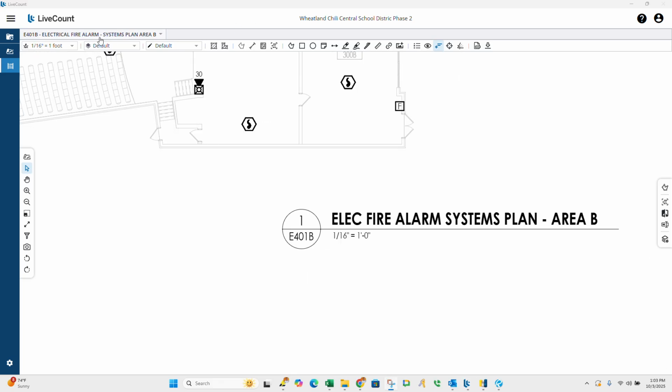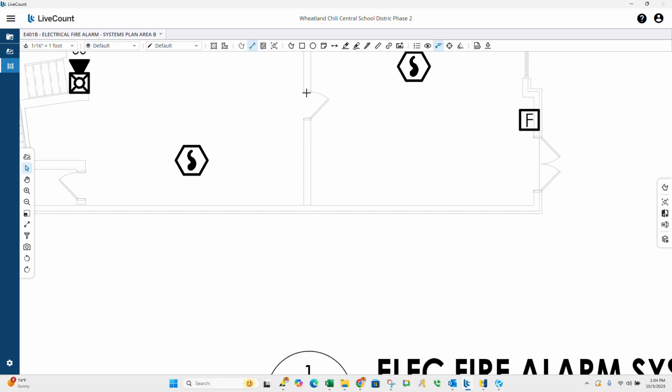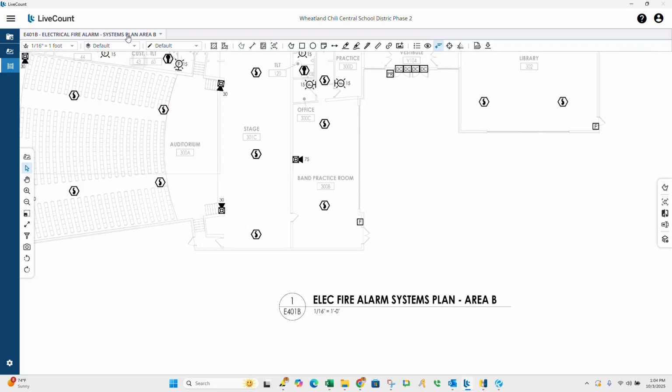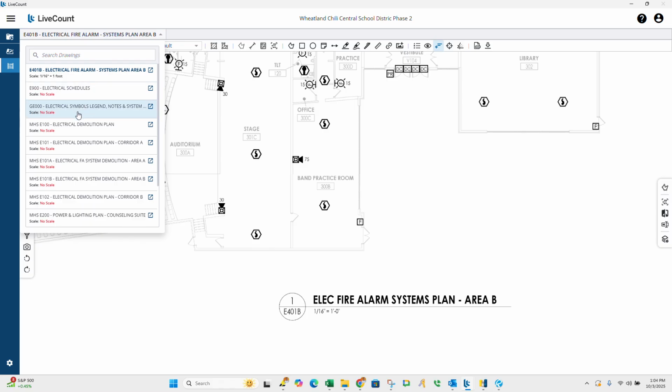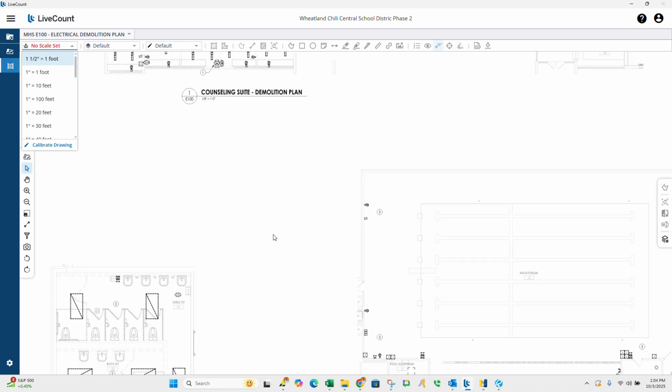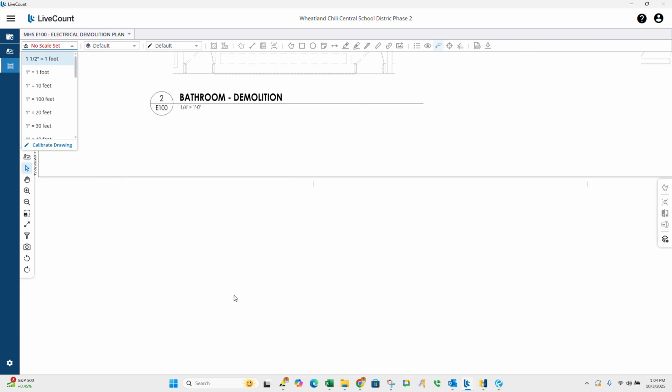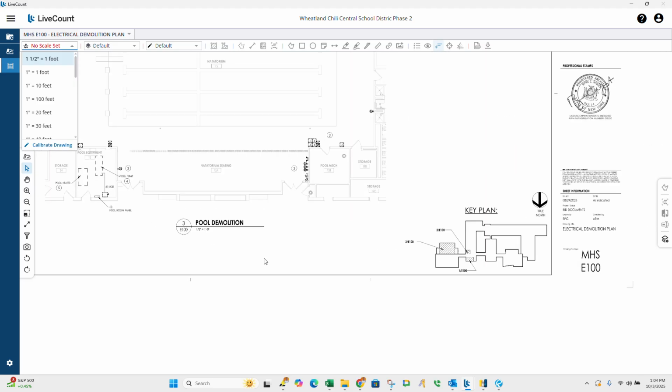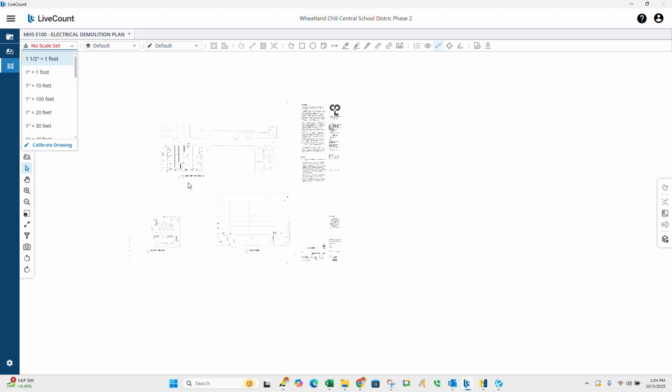And then, okay, the other way to do that is you could take them at their word at what they got right here at 1/16 and just double check a door real quick using the length button. And that's pretty close to that 3 feet. So we know this scale is correct. So I'll go through pretty much each one of these that's going to have something on, and if the scale is correct, I will go ahead and use that.